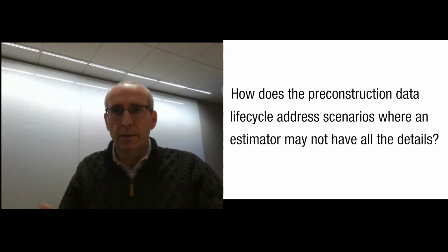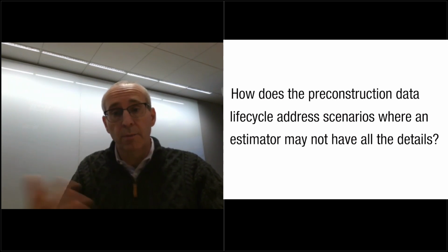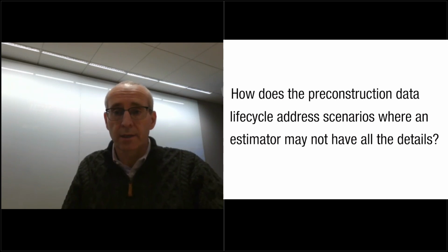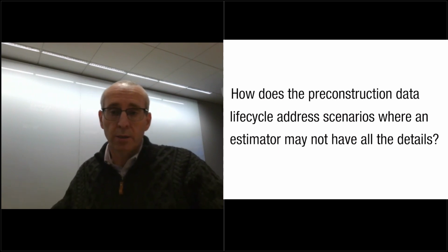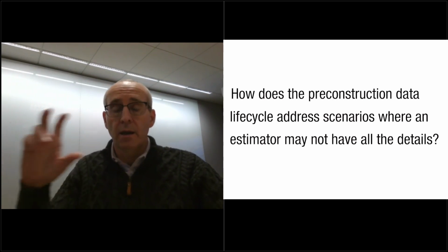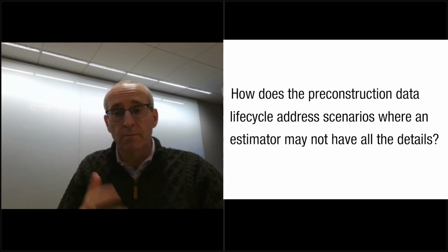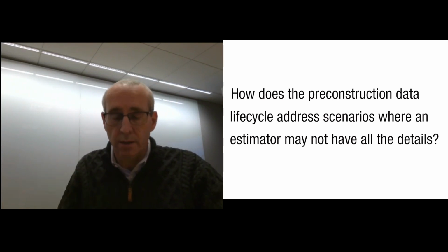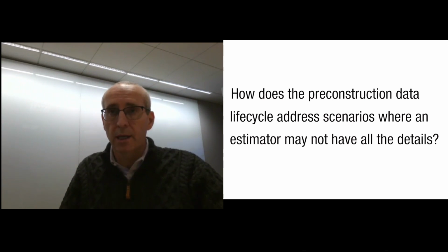So, details need to be completed, but the art of pre-construction, the art of estimating, is really the ability to interpret, the ability to predict. Rather than just predicting it and not communicating it, I think the pre-construction data lifecycle gives you the ability to point to other projects and say, hey, we didn't have enough information, but we're going to use and assume the same details that are over here and be able to include those in your deliverables to your owners and to your subs and to the design team. So I think it gives you a repository of information that you can use in lieu of having incomplete information.